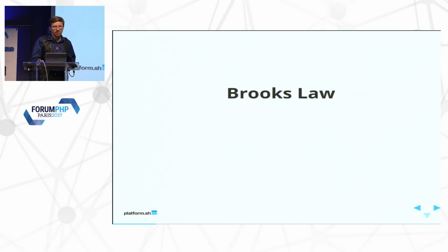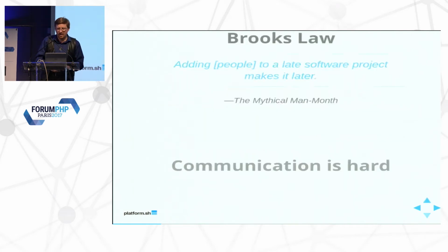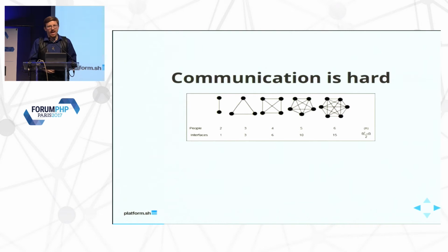First point, who's heard of Brooks' Law? Adding people to a late software project makes it later. Who's heard of that one? Almost everyone here? Okay. Why is this the case? It's the case because communication is hard. Communication is really hard. And the more people you have, the more communication gets hard.